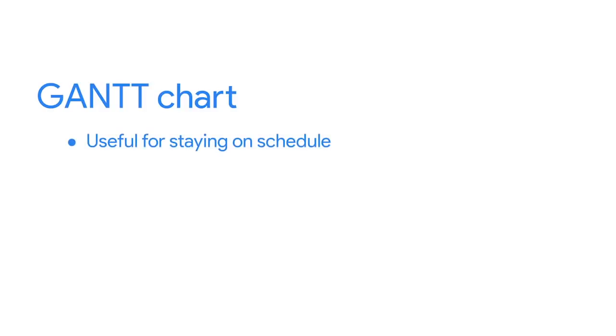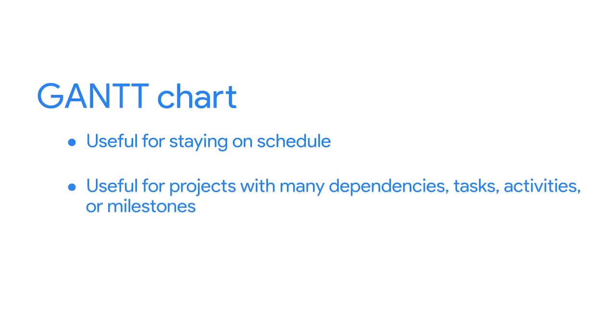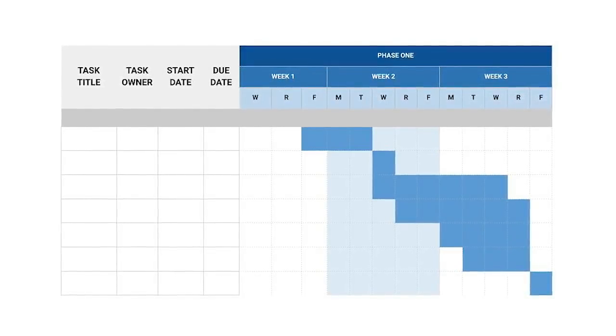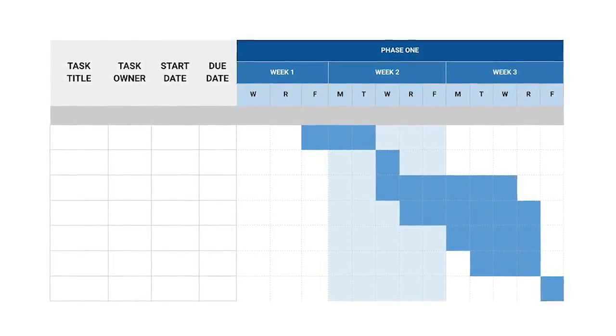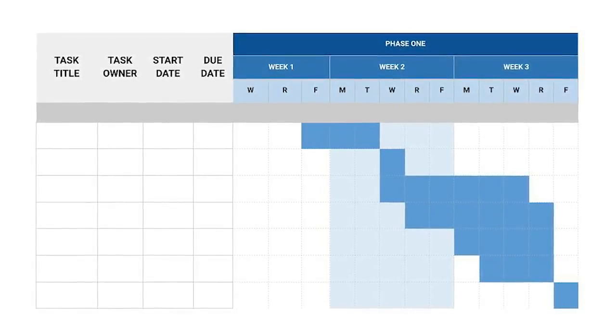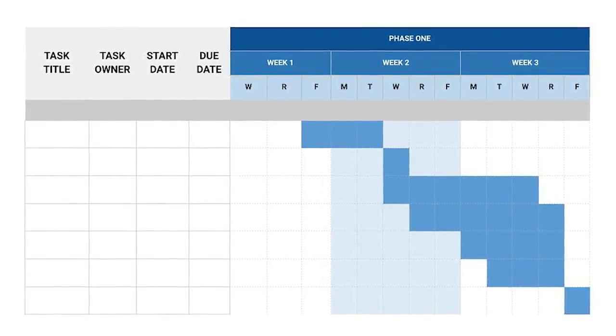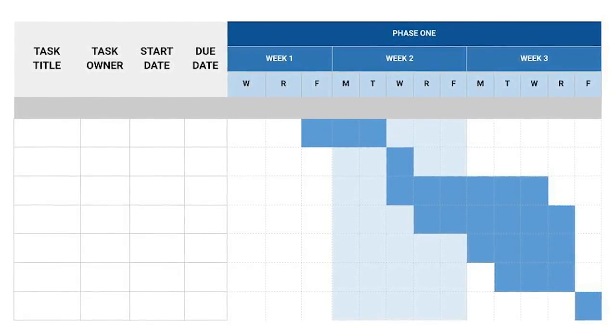Perhaps the most common tracking method of all is the Gantt chart. It's a tried and true tool to keep your project on track. A Gantt chart measures tasks against time and includes useful information like who will own each task and what the order of the tasks should be. It's a useful chart for staying on schedule and for projects with many dependencies or tasks or activities or milestones that are reliant on one another. It's also helpful for teams with a lot of people because ownership and responsibilities are explicitly laid out visually. Each task is represented by a horizontal progress bar, and the bars are stacked on top of each other to denote that the task at the top must be completed before the next one. Gantt charts typically live in your project plan and are updated as the project progresses.